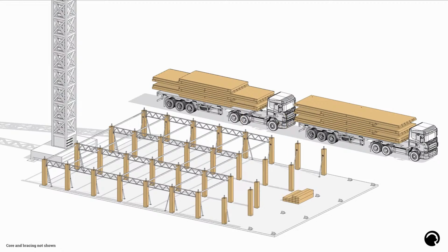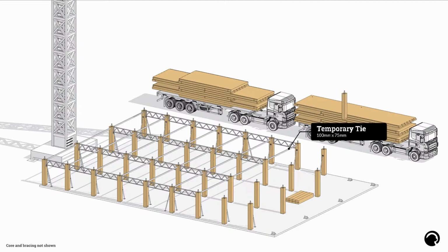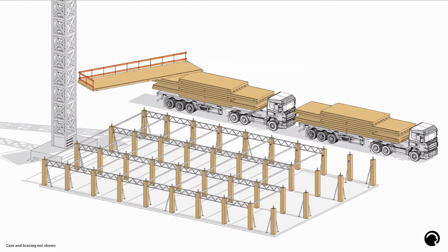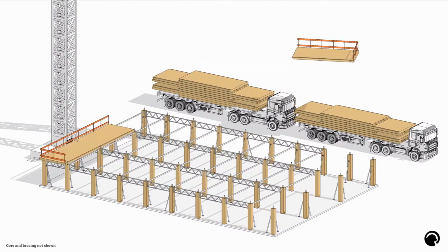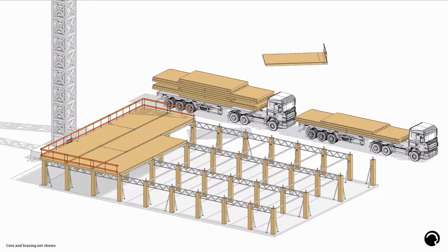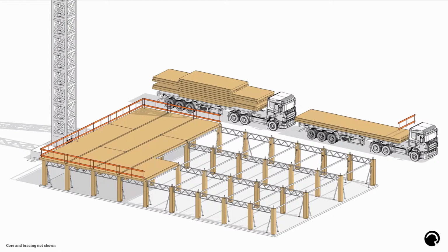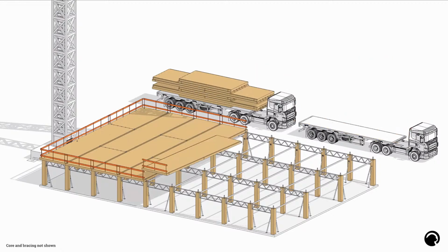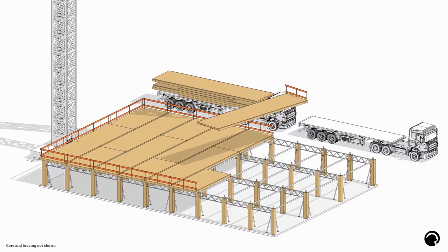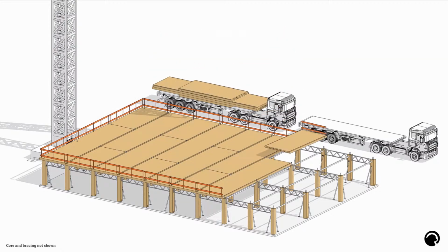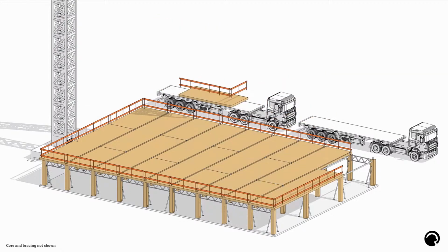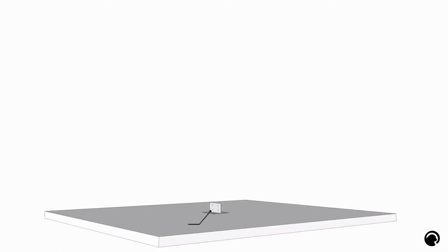So the purpose of these videos was to have workshops with the contractors and say, look, this is how you would do it. These are the sequencing. This is where you'd put on the safety barriers. This is how people would access it. Do you see any problems? And they would go, yeah, we can't have really heavy screw fixings from the bottom. They've got to be from the top. So we had Rothoblaas too as a partner who kind of gave input into that.